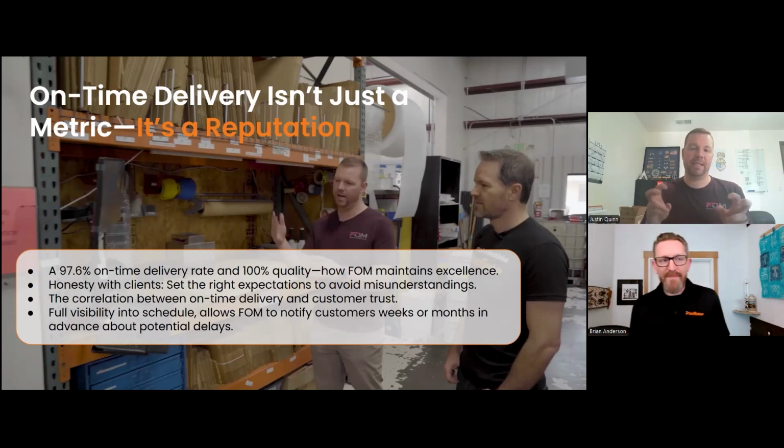The must leave by date that's in Pro Shop is our gospel, right? All my machinists, quality, all of them only know the must leave by. I don't even know if most of my employees would know where to find the actual customer due date. And I'm totally fine with that because it's irrelevant for most shop employees. They don't need to know that this part's going to go outside process at two different places and spend 5 weeks at outside process. They need to know that in order for all that to happen, this part has to leave this shop on this date. That's the due date for them. And so we really live and die by that must leave by date.